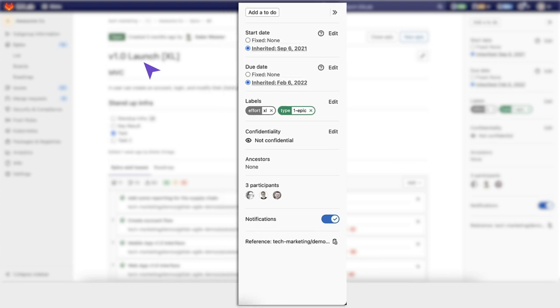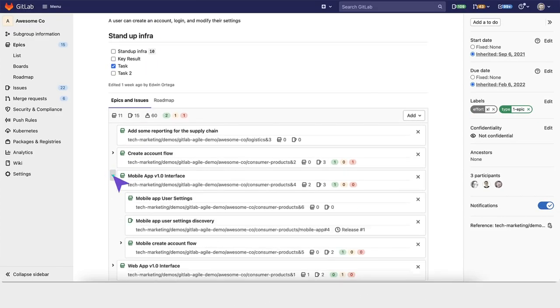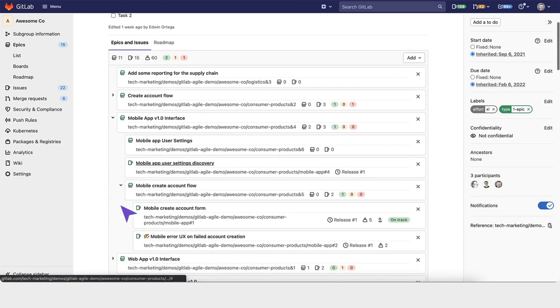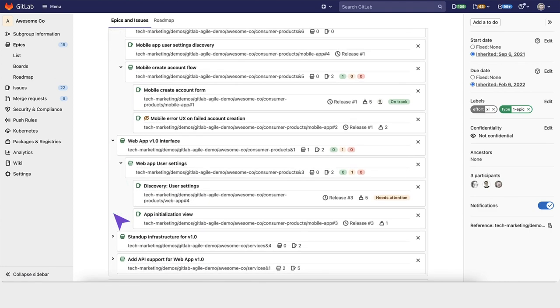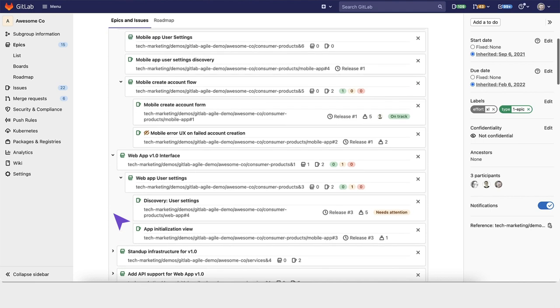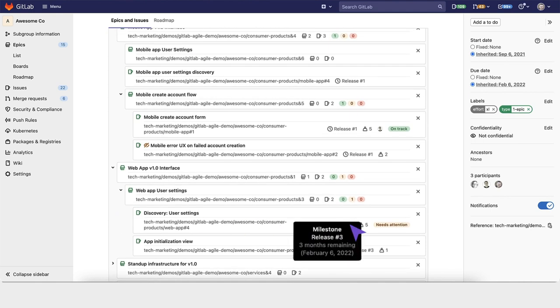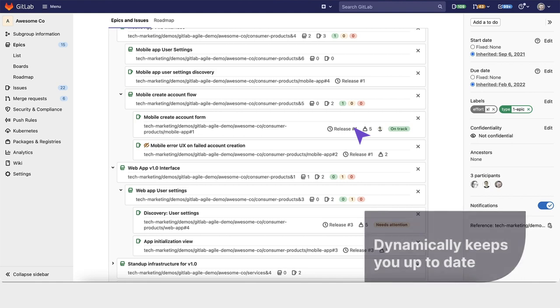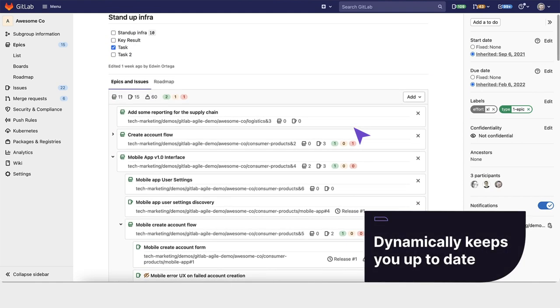Inherited dates work like this. GitLab will scan all of this epic's issues down to the lowest level, determining their tasks, maintenance items, bugs, and stories. It then picks an early start date based on the issues assigned due dates, iterations, and milestones, and that milestone's start date. GitLab then looks at the latest start date it can find across all those time ranges, and dynamically keeps us up to date.